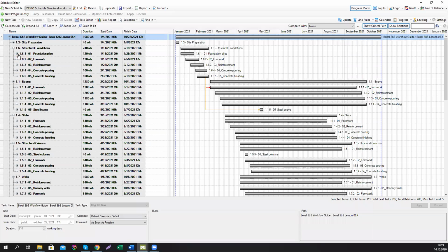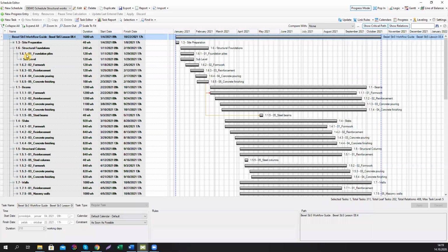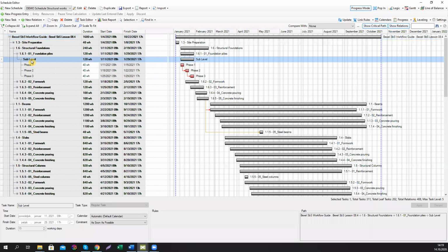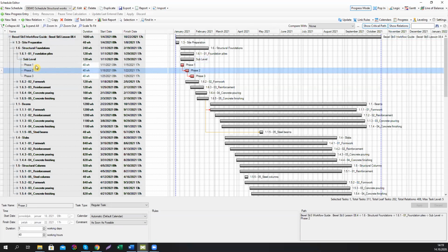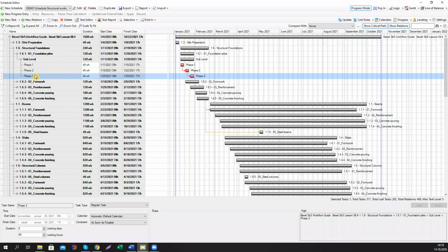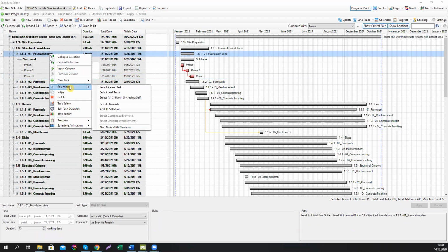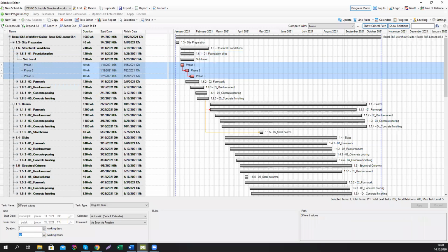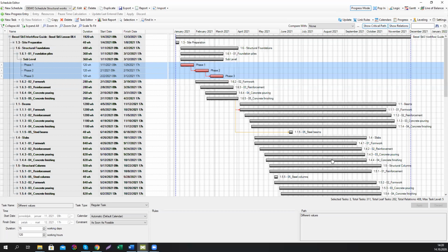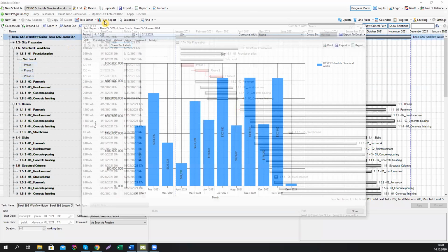So in my opinion, the problem is foundation piles work, which are generally set as the same duration as all the other tasks, and in reality, they always require more money and more skilled operators and more equipment. So it would be wise to actually extend the duration of these tasks, even 3 times, to be honest, to see what we're gonna get.